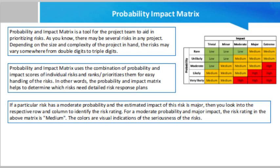Risk analysis is a two-stage assessment process. Initially, qualitative methods are used to examine categories and determine the main risk events identified, which are relevant for a more detailed quantitative assessment. In risk analysis, risk is traditionally defined as a function of probability and impact. Probability is the likelihood of an event occurring, and impact refers to the consequences — to what extent the project is affected by an event. By combining probability and impact, the level of risk can be determined.